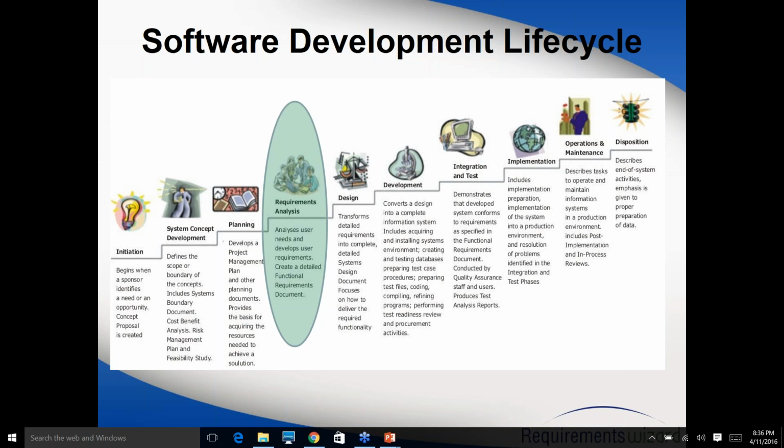Second option, what you can do is re-baseline. You can go back to the customer and tell him or her that, when we started the project, we were under the assumption that that's the only thing we are doing. But now, since we know some more stuff, we have some more requirements, we realize that it's going to cost us 40% more than what we anticipated, because we need more people, we need more time. You can always do that. That's what we call rebaselining.